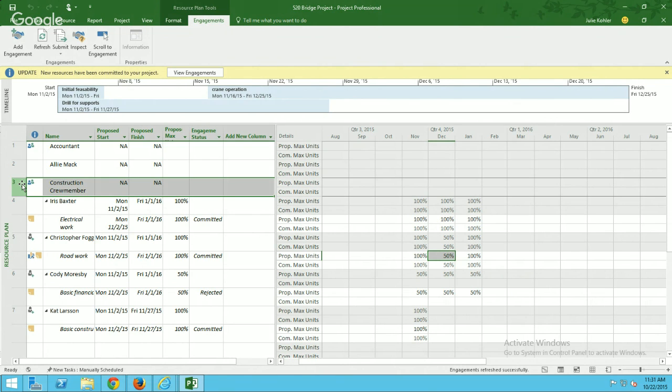Okay. We have another question from Muhammad. He's asking, please also explain how to calculate engagement time of machinery resources. We actually don't allow for engagements for machinery, so it's for work resources only. Okay, good clarification there. So material resources and cost resources won't get engagements. Correct. I don't know about cost resources, but I think material resources would really help if we had the engagement. So when I reserve a piece of equipment, I could ask that. I can see a use case scenario for that.